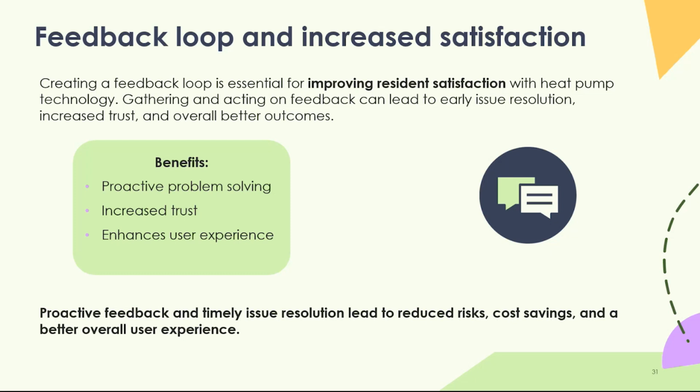So having that feedback mechanism, suggestion boxes, focus groups, collecting that data so you can then improve on things next time, and also identify any issues early and resolve them. So you could implement monitoring systems to detect and report issues early, or particularly early on, schedule more regular maintenance checks based on feedback to address potential problems before they escalate, and letting things settle in.